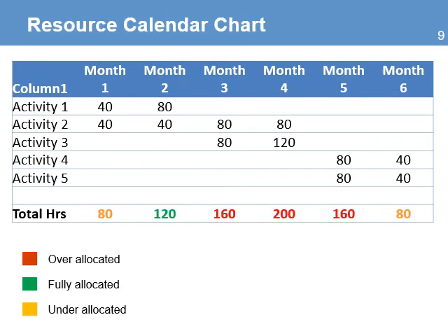While you're assigning work to your team, usually for a cycle, you need to consider how much work you're assigning to your team. One of the tools that you use is the resource calendar chart. For each individual in your team, you can identify all the work that they have been assigned based on the estimated duration of each activity. And for each month, you can see the total hours of work assigned. In the review of the information, you are going to see that some team members have been assigned more work than they can do in a month.